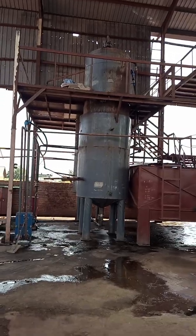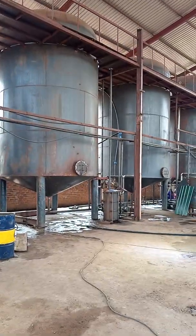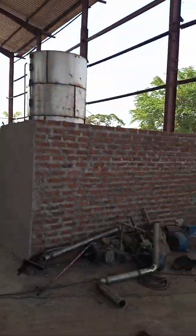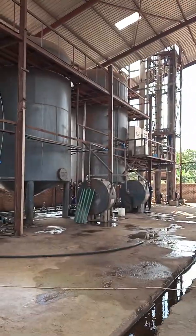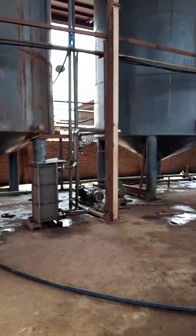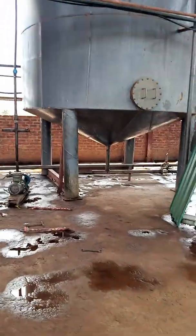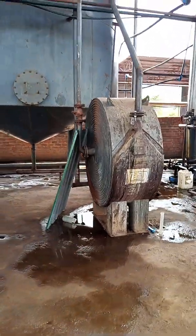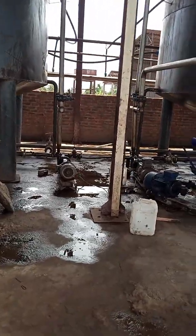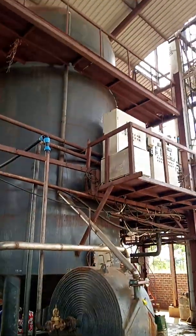This is a distillery — a molasses-based plant washed to neutral alcohol. We are moving on, and the last time I was recording we didn't have all this equipment around. Now the plant can produce spirit. In our original schedule it was to be commissioned in mid-November, but due to unfavorable conditions — rains and interruptions of material supply — we found ourselves commissioning on December 1st. From that day we have managed to produce liters of spirit.